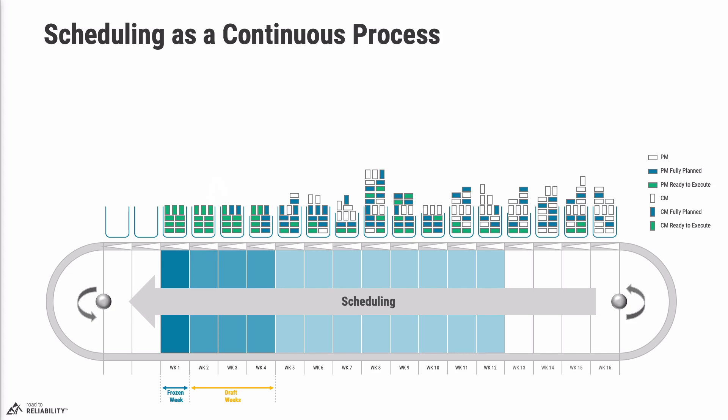It is also key for your maintenance supervisor to advise the scheduler of any capacity changes so that the size of the bucket is adjusted. If that is always done at the last moment, it creates a lot of rework for the scheduler, and that rework will result in the scheduler having less time to put together a solid draft schedule for future weeks.